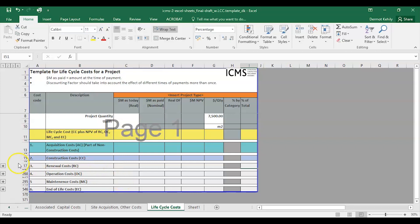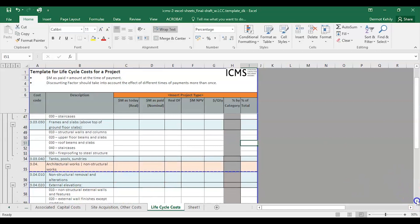Let's pick one particular item and work through it. Once you've got one done, you can fill the calculations all the way down. Life cycle costing exercises seem daunting, but remember that once your template is set up and tested, you can use it time and again — all you're doing is inputting the actual costs in today's money, an inflation rate, and a discount rate.